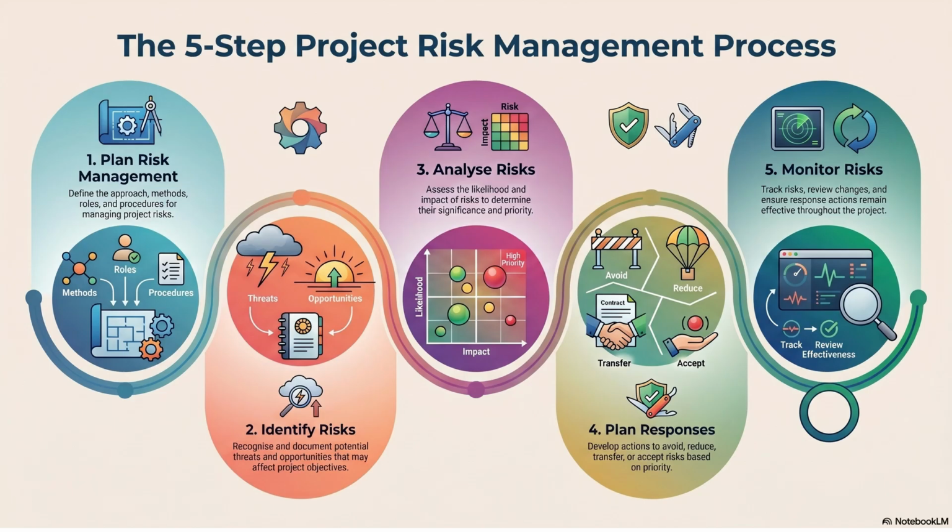First, we plan how to manage risks, then identify risks, analyze them, respond to them, and finally monitor them throughout the project. That is the core process of project risk management.